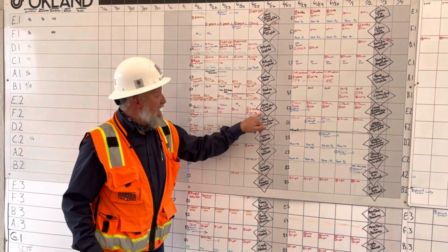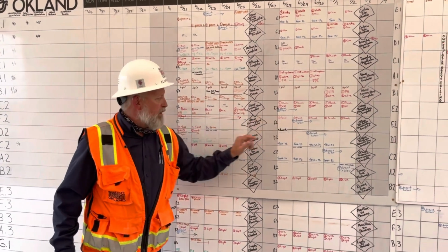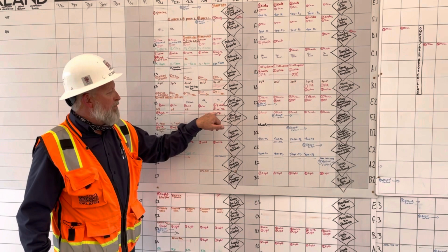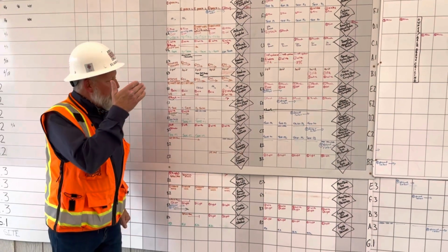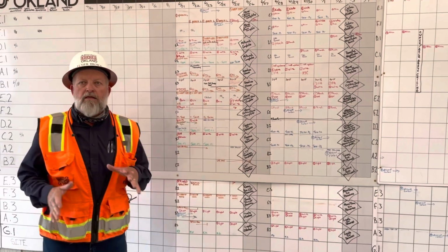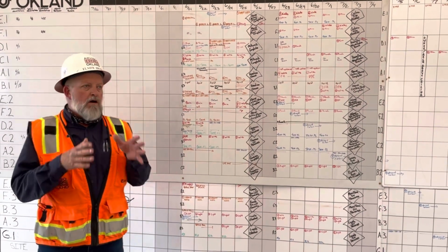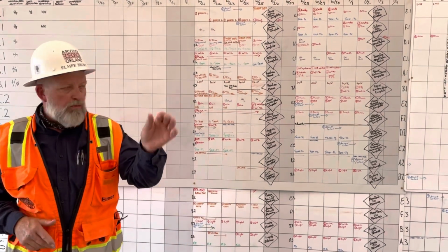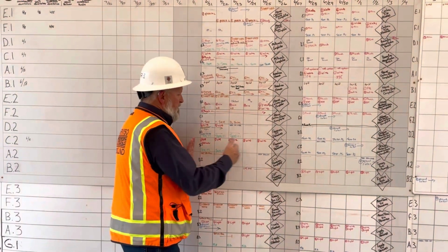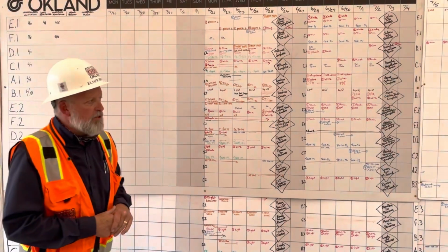So let's take care of that issue with more hours, moving a couple guys that are ahead to help these guys out, or working Saturday, whatever it takes, so that we're focused day after day on the Takt plan, on transferring the Takt plan information week by week into a 5-day period. It's very easy to discuss.